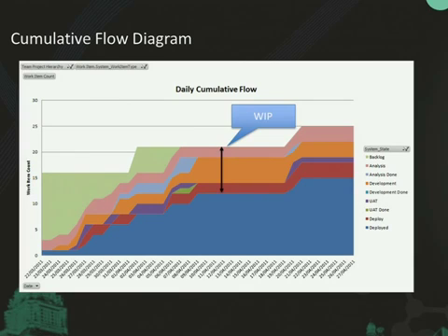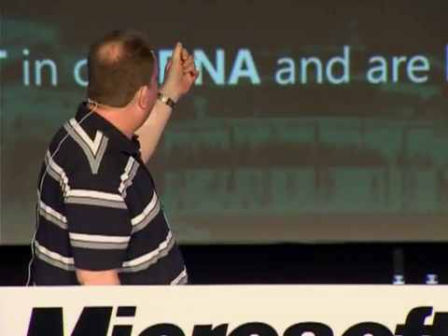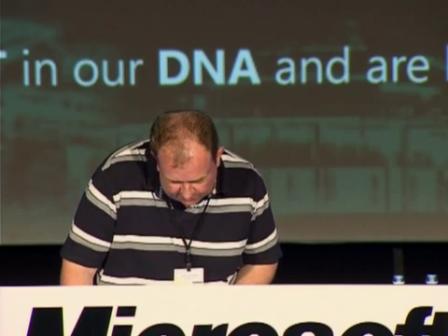If you measure the gap between backlog and deployed, it's actually between analysis and deployed there, the pink lane and the blue lane at the bottom. That effectively tells us how much WIP we've got. So looking at the scale on the left, we've got probably about between 12 and 21.